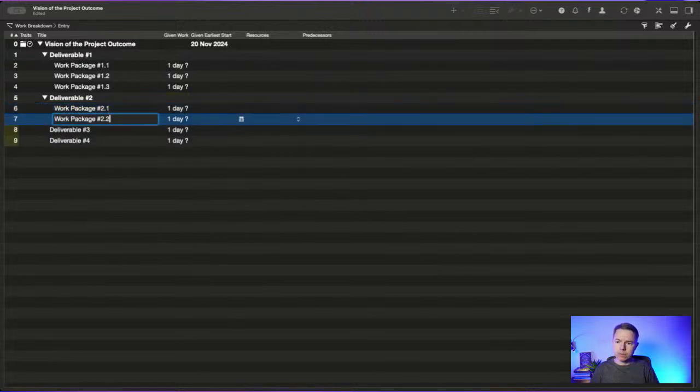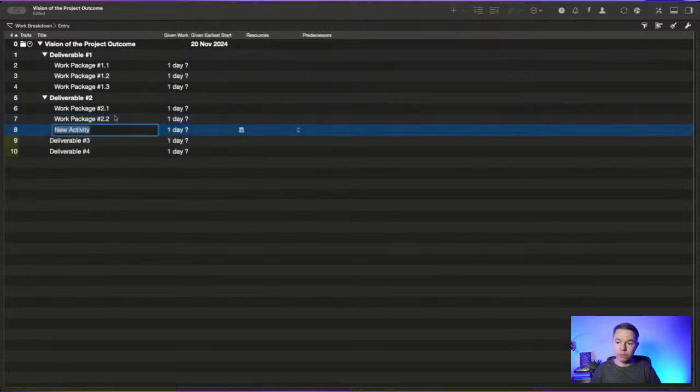One of the rules of a good work breakdown structure is that everything on this list, until you get to the task level, should be named with nouns and adjectives, something that communicates the final state of this piece of work. You can imagine it can be pieces of infrastructure that you need to implement, the software product itself, or multiple components of the product, and so on.